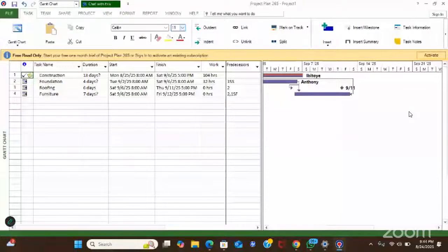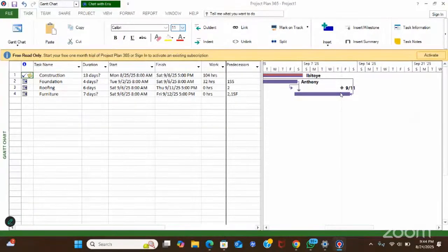So in the lighting pole, you have to include the lighting pole and you have to include the bulb. Those two projects go hand in hand. So the moment you finish the lighting pole, you should be finishing the lighting itself, because you have to mount the pole, then you install the light on it.